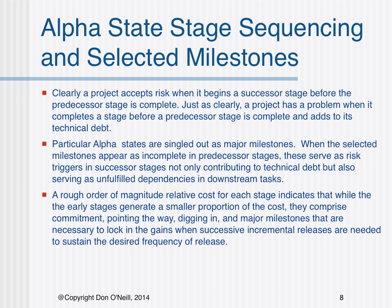Clearly, a project accepts risk when it begins a successor stage before the predecessor stage is complete. Just as clearly, a project has a problem when it completes a stage before a predecessor stage is complete and adds to its technical debt. Particular alpha states are singled out as major milestones. When selected milestones appear as incomplete in predecessor stages, these serve as risk triggers in successor stages, not only contributing to technical debt but also serving as unfulfilled dependencies in downstream tasks. A rough order of magnitude relative cost for each stage indicates that while the early stages generate a smaller proportion of the cost, they comprise commitment, pointing the way, digging in, and major milestones necessary to lock in gains when successive incremental releases are needed to sustain desired frequency of release.